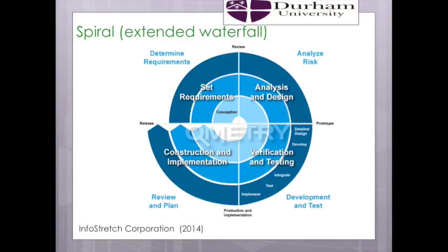However, it arranges the phases into a circle, where during the first iteration it goes through the whole circle by passing a small amount of the project to be developed as the first prototype. And in each iteration, an updated prototype will be developed, and the risk analysis will be applied to each prototype as well. With the spiral model, the client could see the system early because of the developed prototypes. Moreover, here the clients can be close to the software development cycle steps.